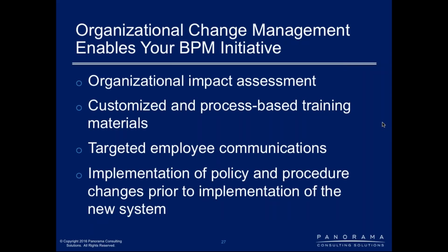So I just stole my own thunder here, but change management enables your BPM initiative. It's the things like the organizational impact assessment, the customized and process-based training materials, targeted employee communication, implementation of policy and procedure changes prior to the implementation of the new system. There's a lot of times where we go through this exercise of process management with clients prior to an ERP or enterprise initiative, and you find that there's a lot of process improvements we can start making now. We can immediately roll those out, get some immediate improvement and efficiency gains without necessarily having to wait for a new technology to get rolled out. Now, certainly when the new technology gets rolled out, it might further enhance or enable that process, but there's a lot you can do without the technology.